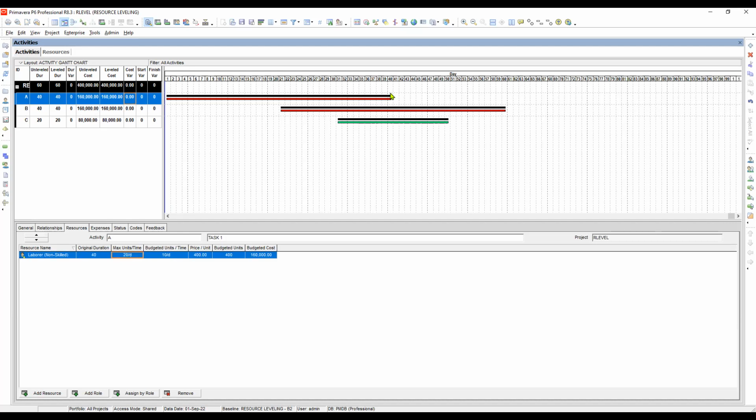If we think we can provide 6 units per day, it will give us 18. So that means your over allocation will be resolved as long as 6 units per day is really the accurate calculation of the allocation of the budget.